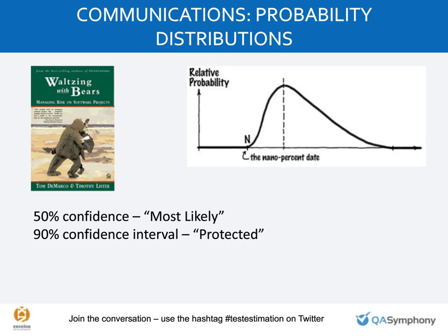You can say our 50% confidence is this number and our 90% confidence is that number, assuming we start right now. Now we're talking about a vector, distance and direction. And what management can do with that is they can crank the dial back. They can go, we want less risk, more time, or more 10% confidence, right?